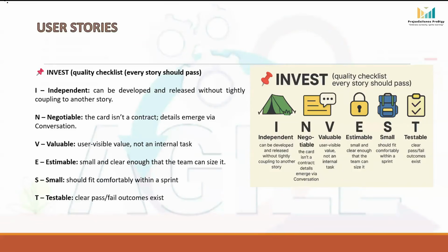N stands for negotiable. A user story is a promise to have a conversation. It is not a mini contract. The wording on the card can change as the team learns more.